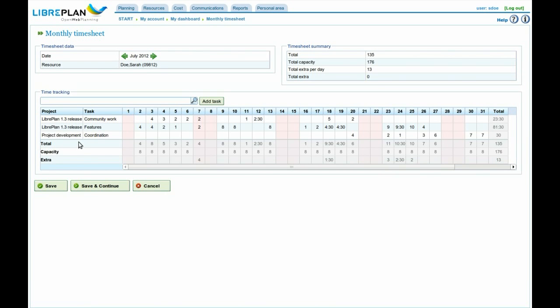When entering inside one of the timesheets, we can also see the amount of workable hours she has each day and the total one, the time she devoted to each task per day, and that compared with the load she had available. So we can also see if she needed to do extra work over the original planning, how much each day, on which tasks, and the totals.